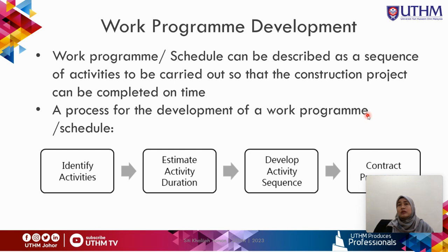Okay, so what you need to do in the first stage is identify all the activities that might be involved in detail, so that you will not miss any activity in the construction, because each activity usually involves cost and also labor and material, which are resources. So for you to detail out what are the resources required to complete that particular task, you need to understand what is going to happen on that particular task or stage.